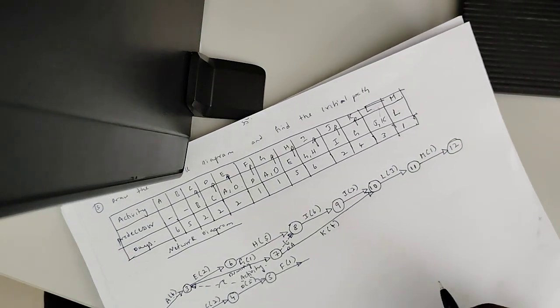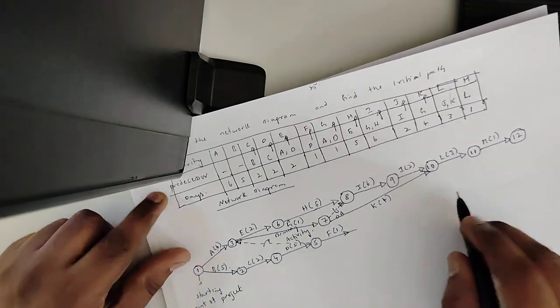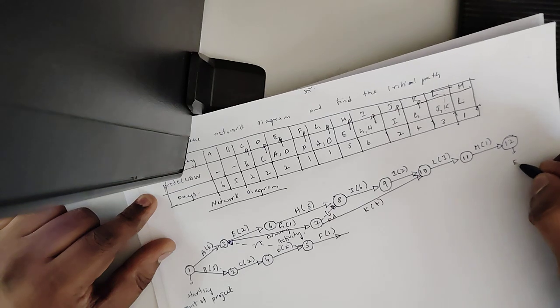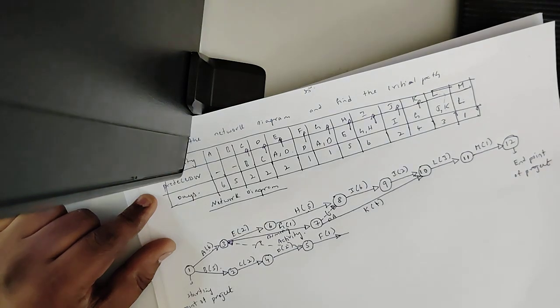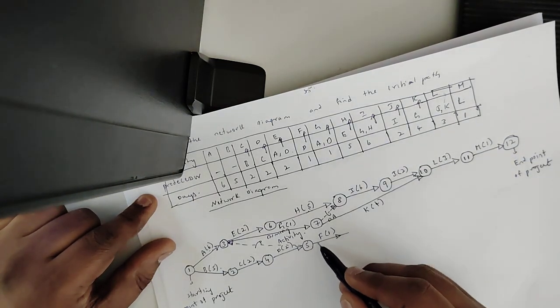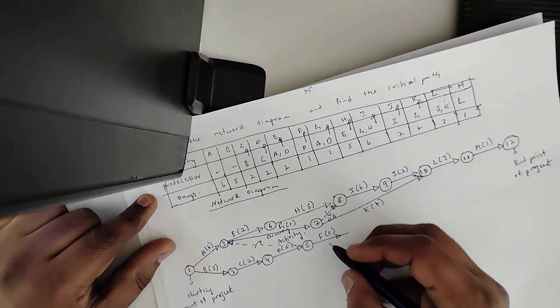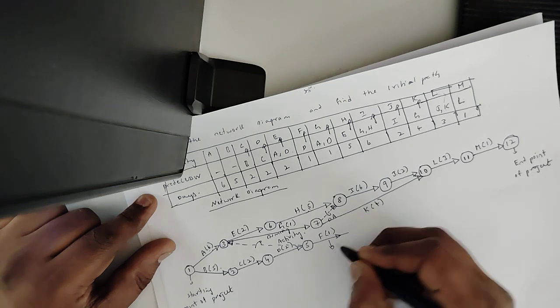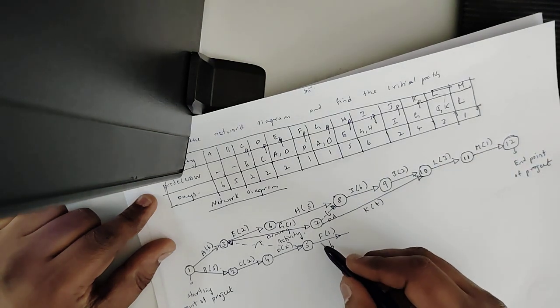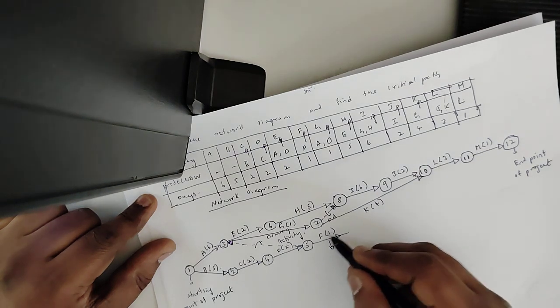So this is the actual network diagram. So this is the end point of project. Is it fine? Now if you see, the network diagram is not complete because here F is not connected to 12. So this error, which you can see here, the network is not completed from the 5th event to 12th event. That is for F activity.